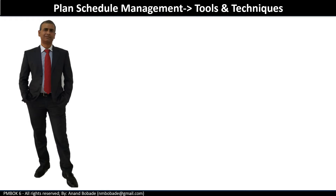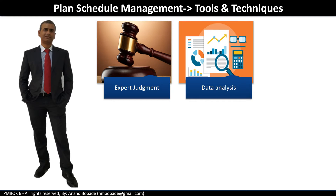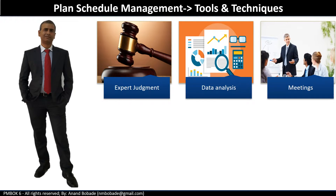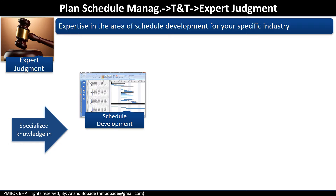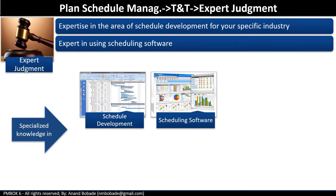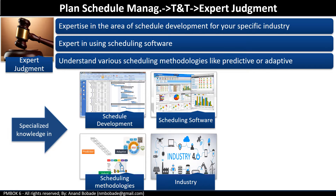The tools and techniques required to create the schedule management plan are expert judgment, data analysis, and meetings. For expert judgment, expertise should be considered from individuals who have expertise in schedule development, including use of scheduling software like Microsoft Project or Primavera, understanding of various scheduling methodologies like predictive or adaptive, and experience creating schedules for projects in a similar industry. For example, a technology lead who has worked on various similar software projects in the organization can be called upon as an expert to help with planning the schedule.